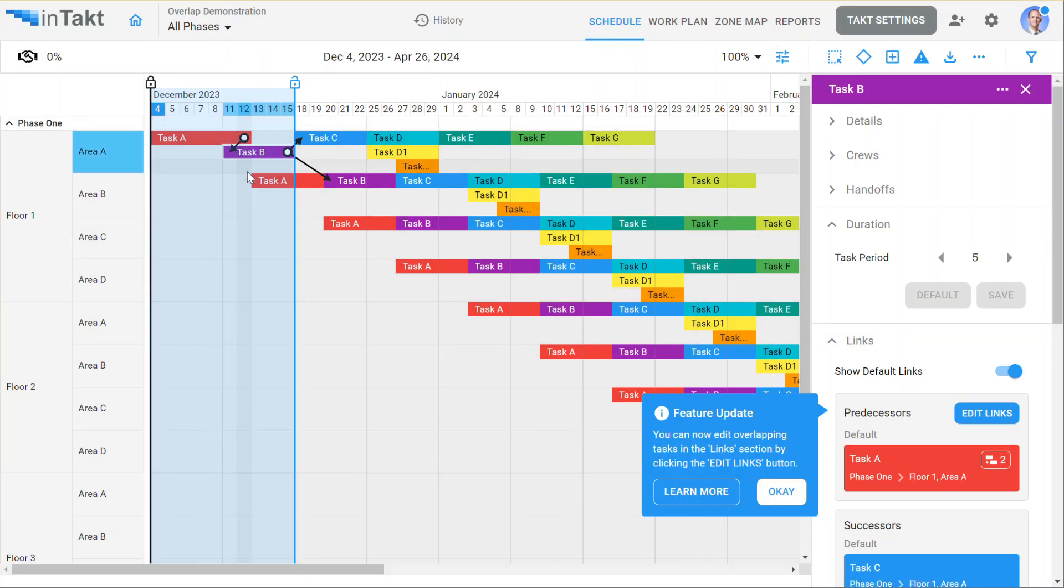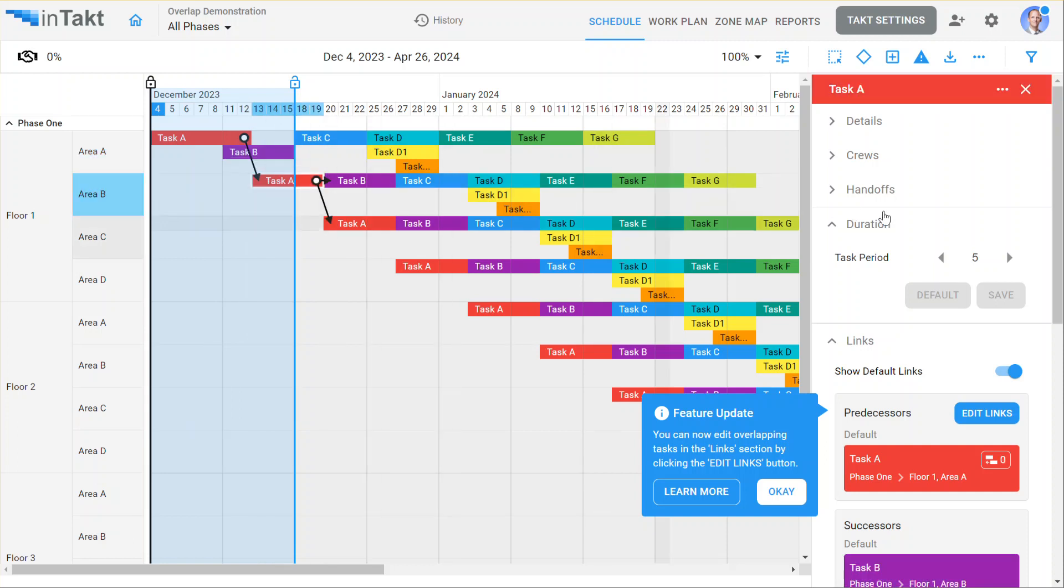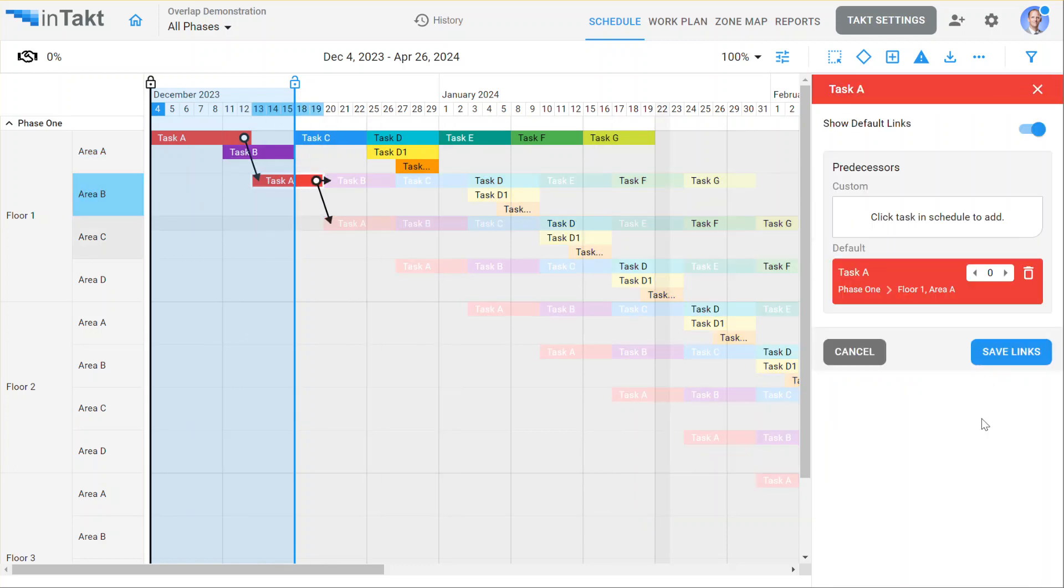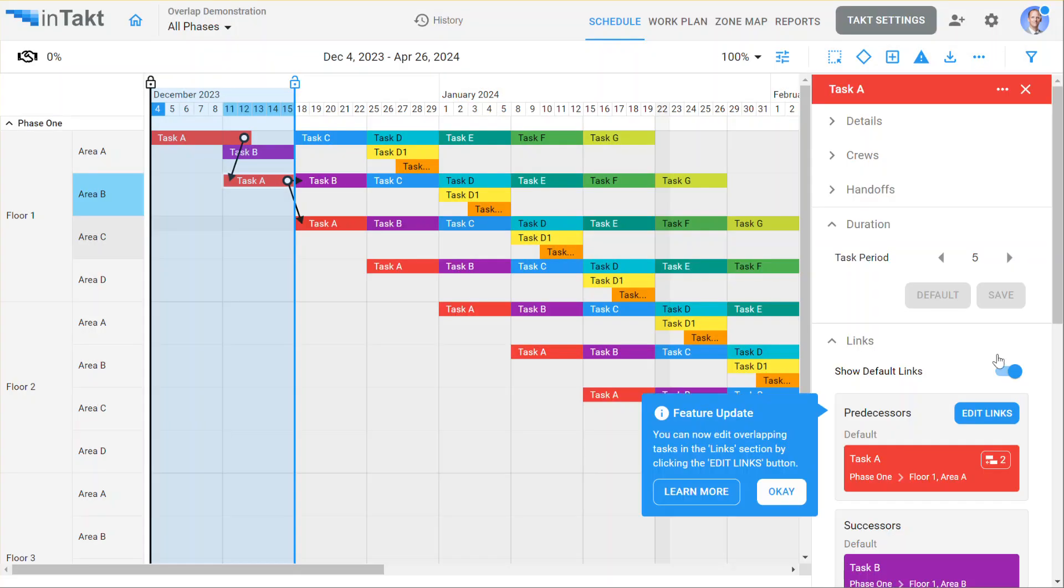You'll notice now that task B is able to overlap that. I'll do the same for this task A here. Edit these links. And a positive value makes it overlap to the left. A negative value will push it to the right. It will automatically build all the CPM logic accordingly.